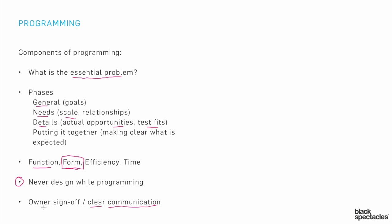The owner should absolutely sign off on the program — put their signature on it saying this is the program, this is the document that tells the effect we're looking for, the scale, the budget, the goals. If you write a program and they don't sign off, there's always an opportunity that they don't absorb or assimilate that information, and they don't have that sense of ownership. This has to be a two-way — actually more than two-way, with lots of different players — street of information going back and forth. You're creating a document that is a tool for that specific communication moment.